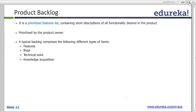Now this backlog is maintained by the product owner. The main task of the product owner is to keep this product backlog prioritized and up to date. If there are certain requirements which were initially needed and are no more needed, it's the duty of the product owner to remove them. And if there are more requirements coming in, it's their duty to add them.